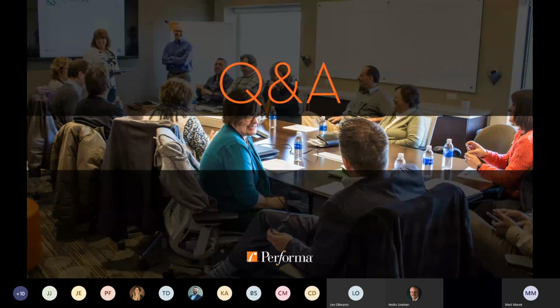One of the first questions was, how do you calculate CRV? That is a great question because I like to think of it as much of an art as it is a science. The reason I say that is it's highly dependent on geography and current economic conditions. Even if you use a program like RS Means, I think they generally undervalue CRV. And a lot of times the real CRV does not align with insurance projections.